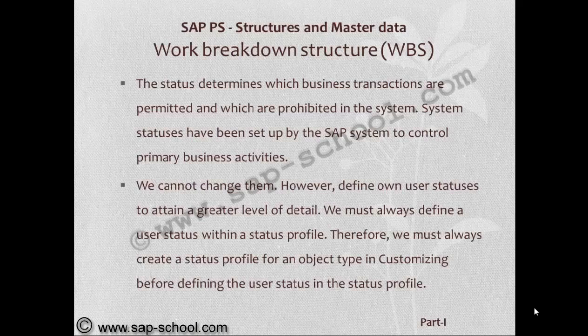System statuses have been set up by the SAP system to control primary business activities. We cannot change them, however, we can define our own user statuses to attain a greater level of detail. We must always define a user status within a status profile. Therefore, we must always create a status profile for an object type in customizing before defining the user status in the status profile. So the status profile for the user statuses plays a very great role in the business process